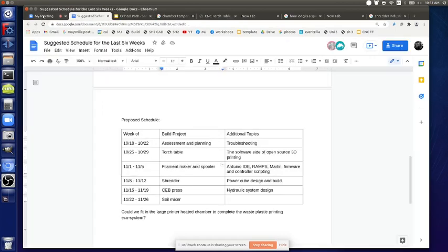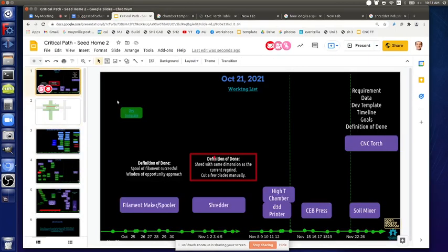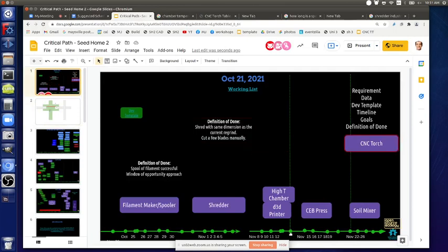Okay. So the big thing is, if we throw the CNC switch back into our second week, with the shredder, the parallel tasking would be really important. We have to start the week working on the improvements to the shredder and the CNC switch, doing everything possible in parallel with the shredder prior to the blades. Right? And then by Wednesday, you need to have some convergence. Otherwise, by Wednesday, we'd have to just keep making the blades by hand.